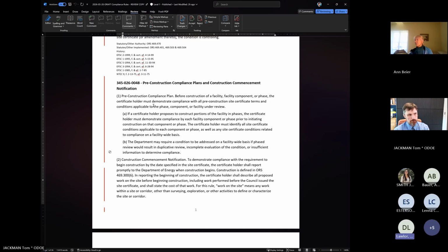Yeah, staging of construction. Probably the best way is the solar and battery energy storage. When you're doing a hybrid system, the battery energy storage often does not take nearly as long. Sometimes you don't even do your clearing for that site, so you might not even have your 1200C for that specific part. You might. It depends on who you're working with and when you're planning on doing that.